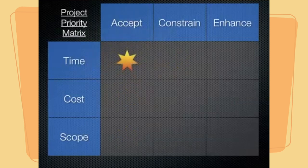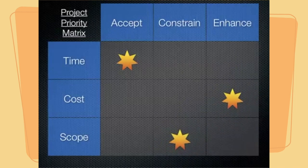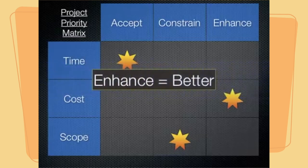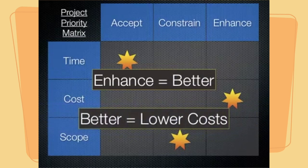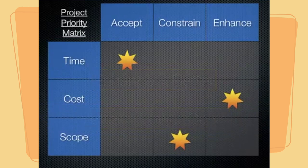Let's look at another example. In this case, we are willing to accept changes in time, we are going to enhance cost, and we are going to constrain the scope. When we say enhance cost, think of it as better — meaning lower costs. So in this example, we are constraining the scope, we would like to reduce cost if possible, and we are certainly willing to accept some delays in project completion if it will, in fact, decrease the cost of the project.